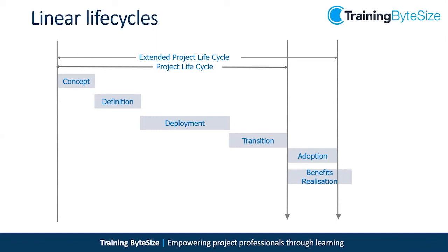Adoption is the user has to understand and facilitate and begin using the product in a real world. It's been tested and everything, but tests and trials only yield so much information. When you start actually using the thing in the real world, things change you didn't anticipate. So we have an extended project lifecycle, which allows a project team to scope and prepare to support, to remain on during the adoption phase of this lifecycle, the extended project lifecycle.